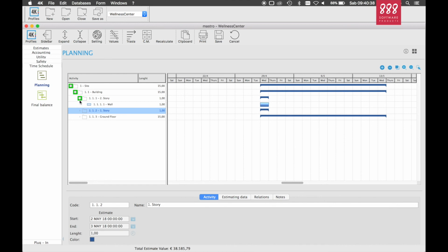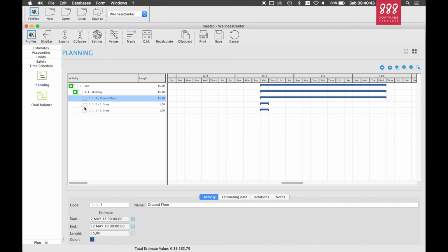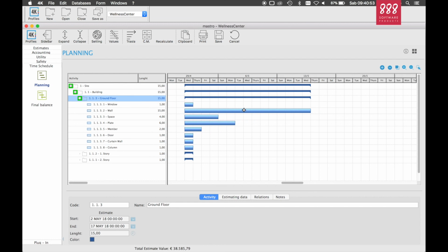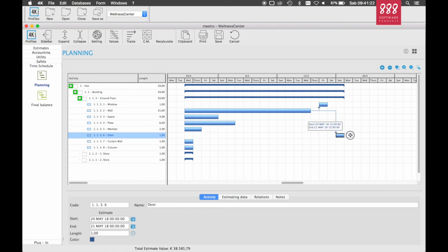The users can then change the display order of the Gantt diagram by simply rearranging the activities in the tree list. These activities can also be linked together so that one activity will start right after the first one is complete. The linking procedure can be done with a simple drag and drop and will automatically shift the activities. Finally, this activity can then be manually scheduled by simply dragging it in the Gantt diagram. It's cPlan that will take care to keep in sync every constraint and to update the overall project duration.